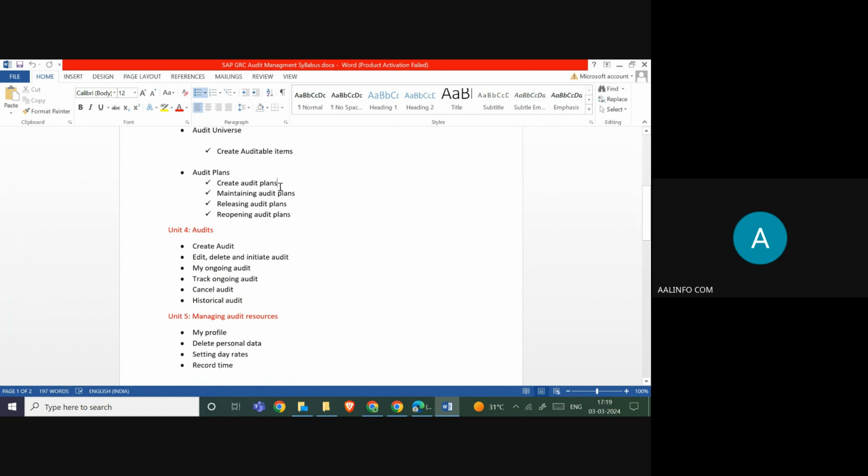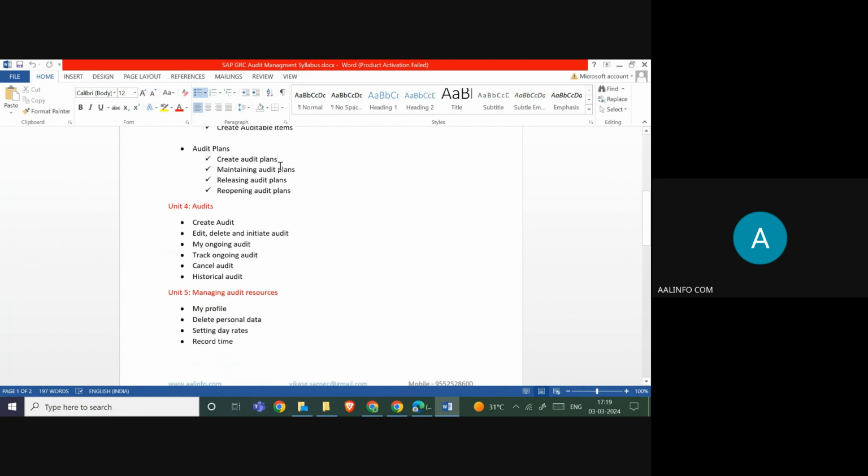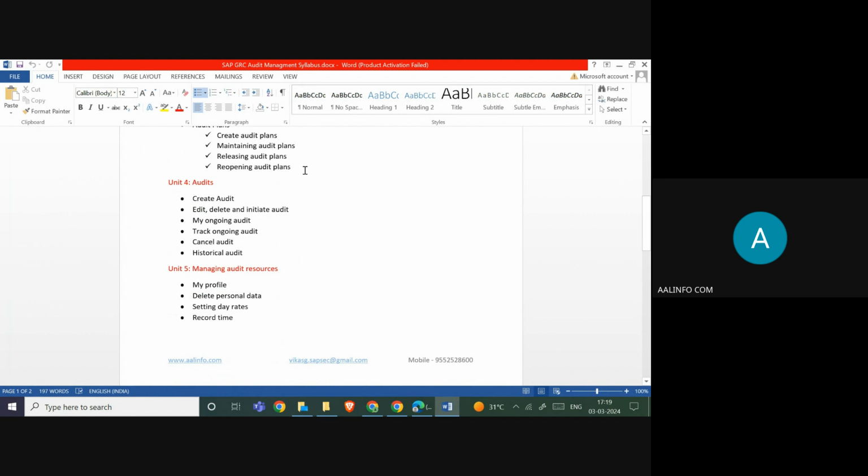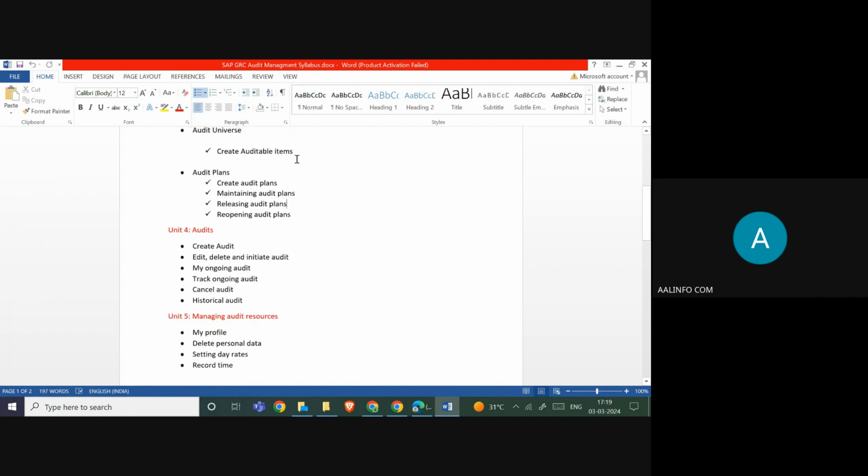You define the audit plan, and in defining it you can plan how many people will be involved in the audit, what specific time will be required to perform the audit, right? And then who are the resources, what is their effort, how much price is required, because effort comes with a price, right? So how much will it cost to perform this audit? Who will be the person or owner owning this audit? Who will be the reviewer who can review the audit, right?